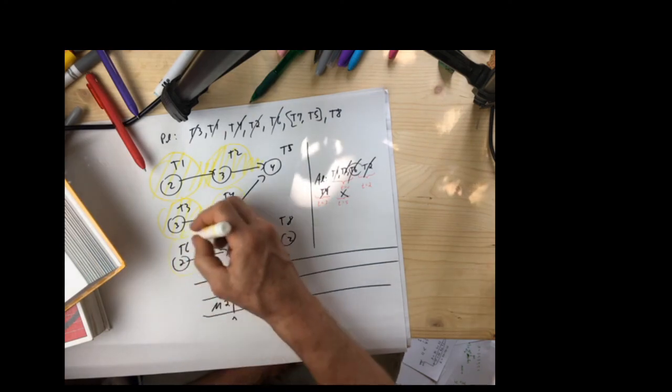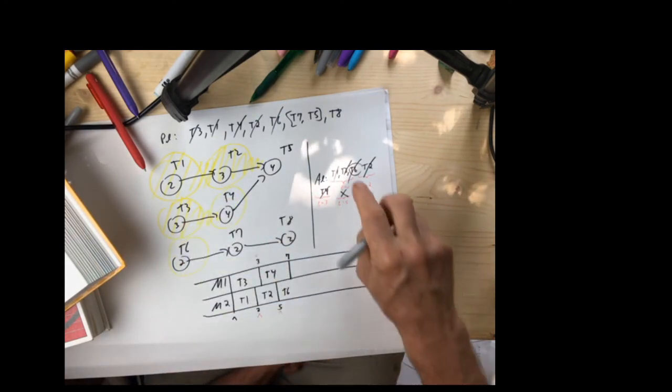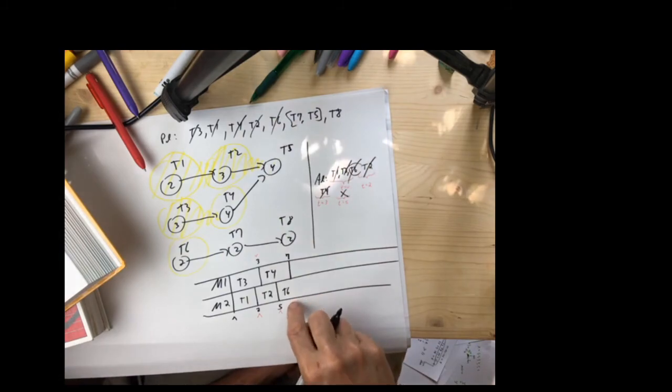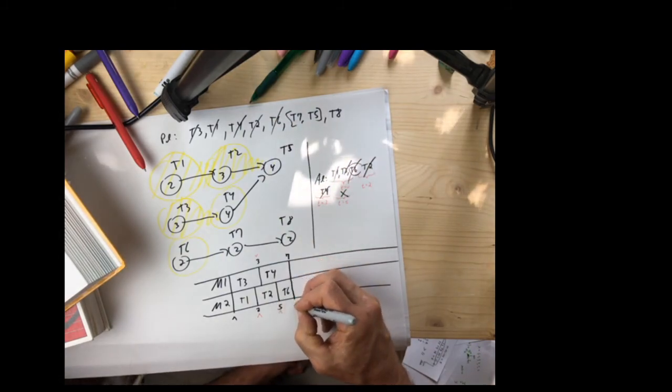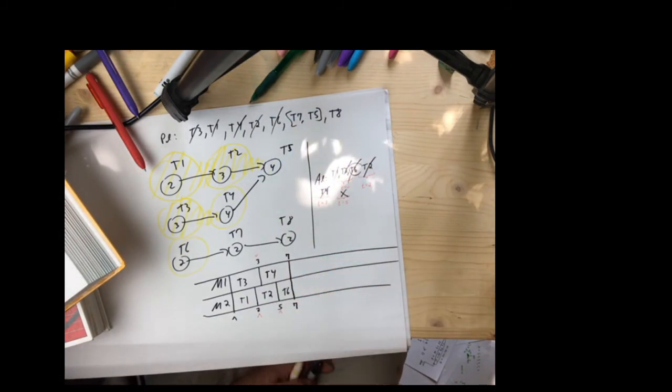So T6 has been assigned. Updated that, updated that. Oh, I've got to put my end of time marker in there. Oh, it goes right out to 7. Interesting. Okay. 2 jobs running. Let's take our nap. Who wakes us up at 7 o'clock? Why, both machines. Machine 1 and machine 2 finish.